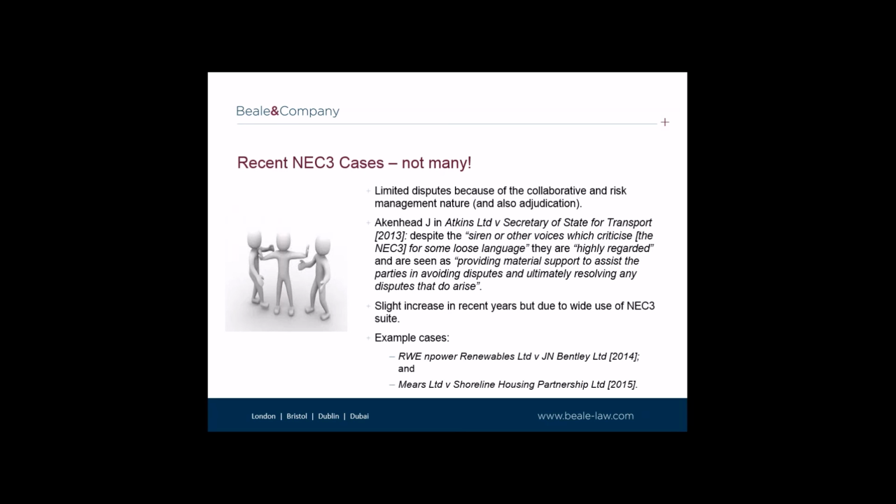They also argued that clause 10.1 of the contract should be interpreted on the basis of the shared value and norm of behaviour of partnership, and there was an implied term that Shoreline would not take advantage of Mears for departing from the strict requirements of the contract without warning Mears. The judge held that Shoreline was not entitled to make deductions as there was an estoppel, most obviously by convention